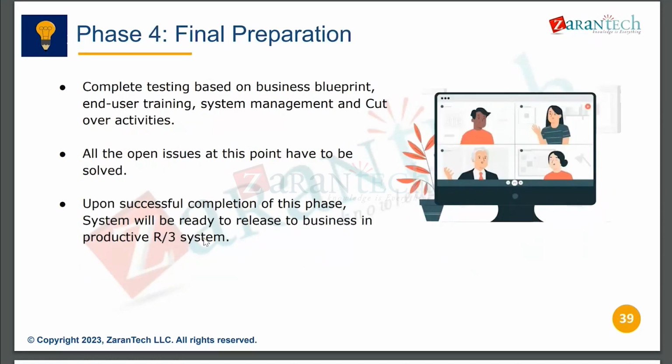And this is final preparation. So all the user acceptance tests as per the blueprint will be completed, and user trainings will be done. System management and cutover activities will be finalized. So, one more thing is very important in the final preparation. Whatever open points and open issues we get as feedback from the business during UAT or any phase before go live, we have to complete that in the final preparation.